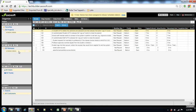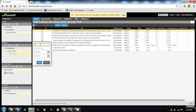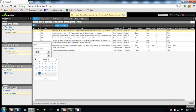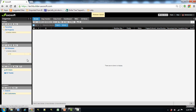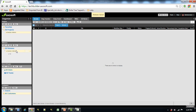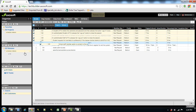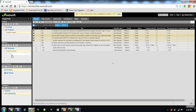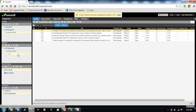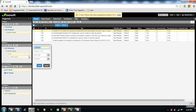In the current release we will create a new version, Version 1.0. Here also we cannot specify the capacity because we don't know how much the team can handle. Let Version 1 be for one month and save. This is the release backlog. We will select some of the user stories and put them in this first version, and this would be the version backlog.